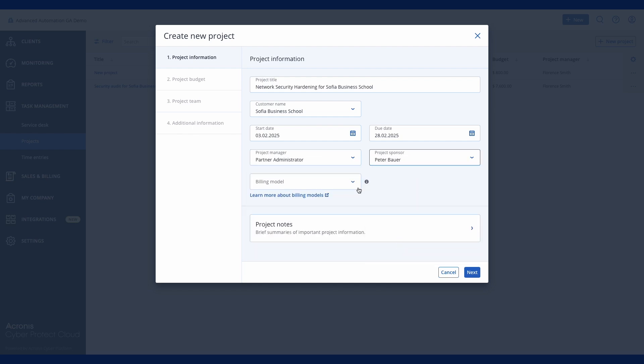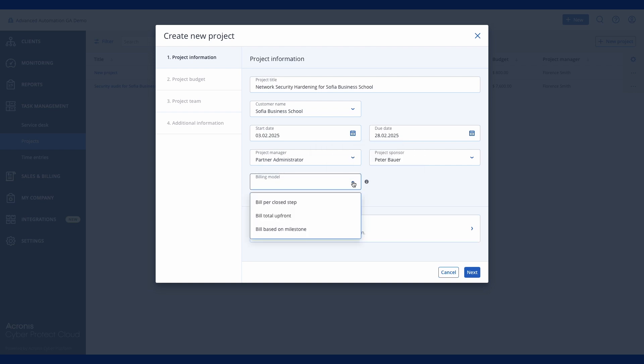You can choose from three popular billing models: Bill per closed step, Bill total upfront, and Bill based on milestone.